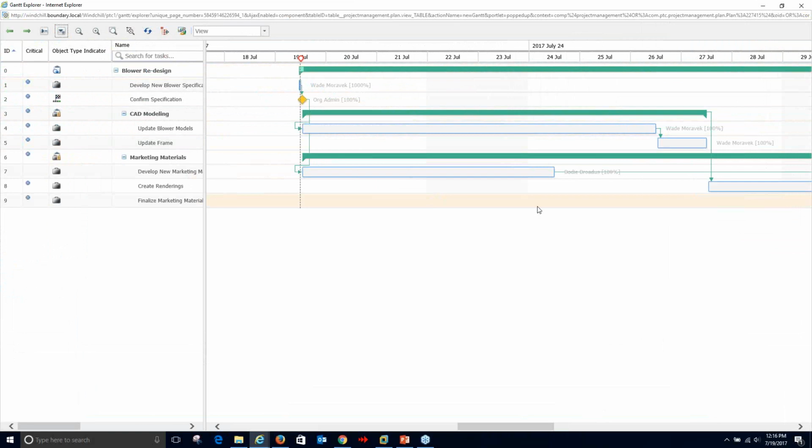If I was on manual execution, even if I mark this completed today, if the estimated finish was tomorrow, it still leaves that as the finish unless I go in and manually edit that. So if you sometimes find out on Friday that something finished on Wednesday, and you want to mark that complete and still leave Wednesday as the finish date, instead of adding 2 days to the plan, you would want to use manual execution in that case. So with automatic, when I hit complete, that's going to become the completion date.